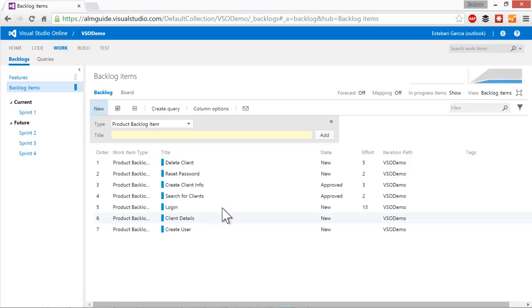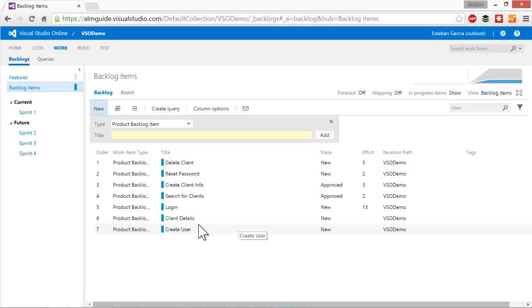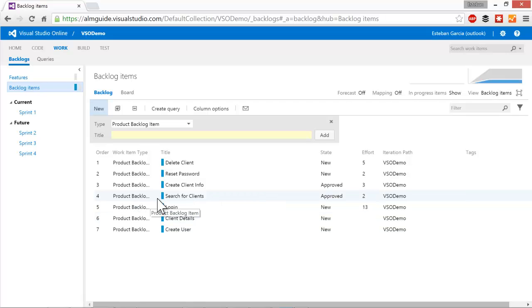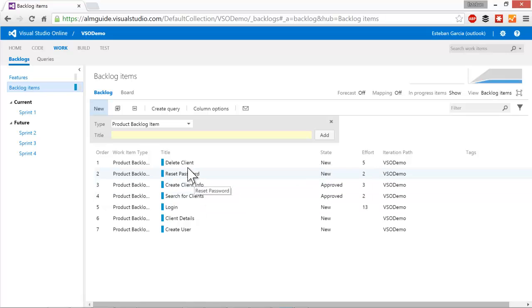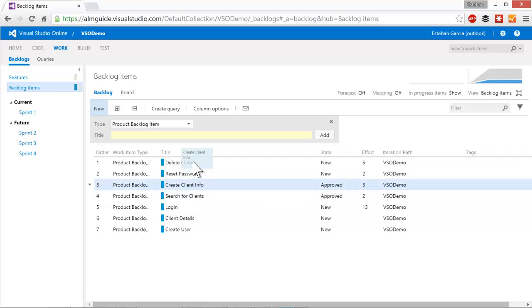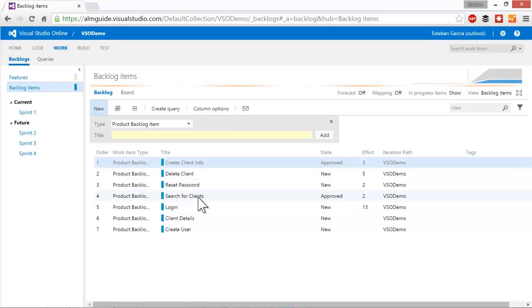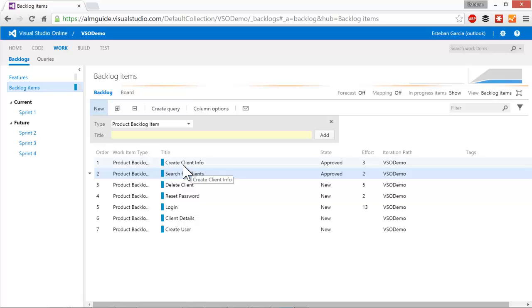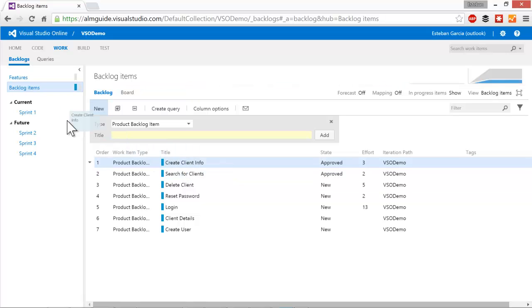And we can see that the first two stories in the backlog are my delete client and reset password client. So here I go to the backlog and I see there's a couple of stories that have been approved. They're a little bit lower in the priority, but those are the ones that are ready for us to work on. So create client info and search for clients, which actually makes sense. We wouldn't want to work on delete client if we can't even create clients, right? So probably makes sense for us to move this tool up in priority.